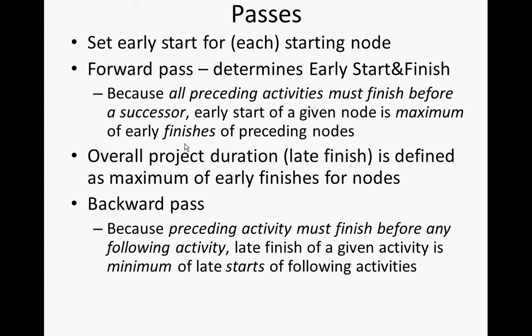And here we're going to define the overall project duration. The finish of the whole project is defined as the maximum of the early finishes for nodes. So we'll view the project as complete at the last of the early finishes, once we're sure that we can complete all of the tasks within the project. So the maximum of the early finishes, the maximum of the latest time that's required given everything that has to be done. Okay. So we're going to go through a forwards pass, and we're going to go through a backwards pass.